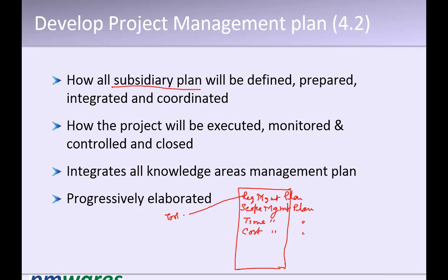What tools and techniques are we going to use to collect requirements? How are we going to analyze? So when the business analyst team or any team goes for gathering the requirements, they know what they need to do. Things are not left to their choice. It is already written in the requirement management plan how they need to gather the requirements, how they need to analyze, what tools they have to use to analyze, and what metrics they need to collect.